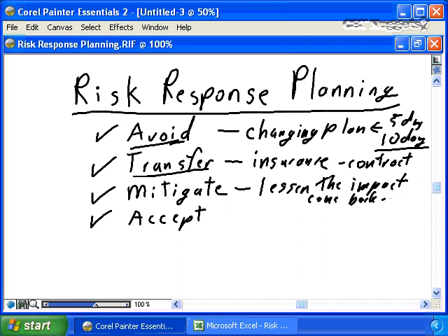and provide peer review for the first few days of the project. So you're taking the appropriate actions to mitigate. So effectively you are again changing the project plan to minimize the impact for the risk, but with mitigation you still need to have appropriate contingency, dollars or time, based on the fact that your mitigation strategy may not be sufficient to eliminate all of the risk.